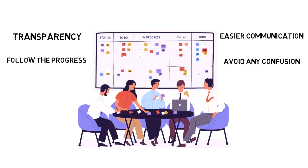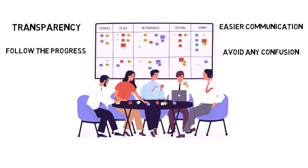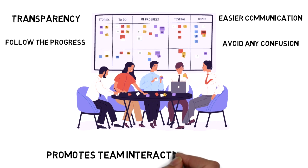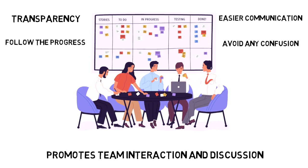Having a Scrum or Kanban board can be used to promote team interaction and discussion. During the day, you will see teammates, stakeholders, and members of other teams stop by the board for discussion. This increases greatly if the board is located near the team and highly visible.